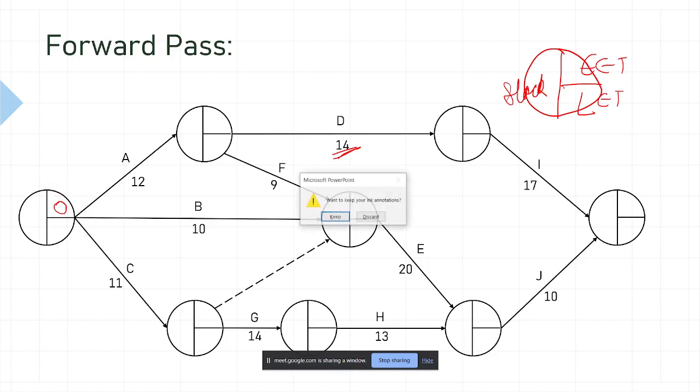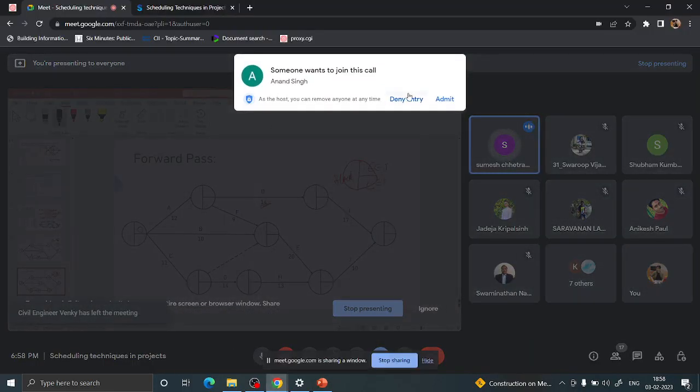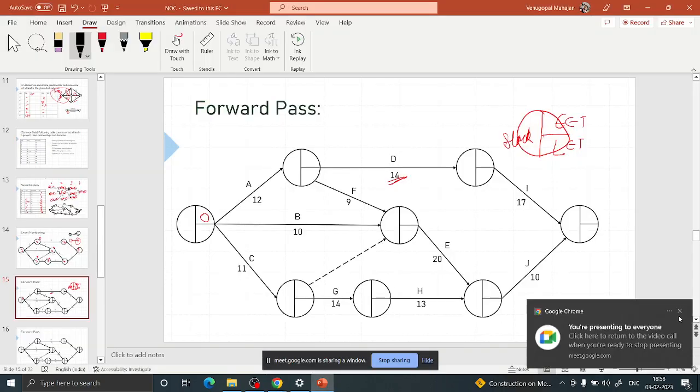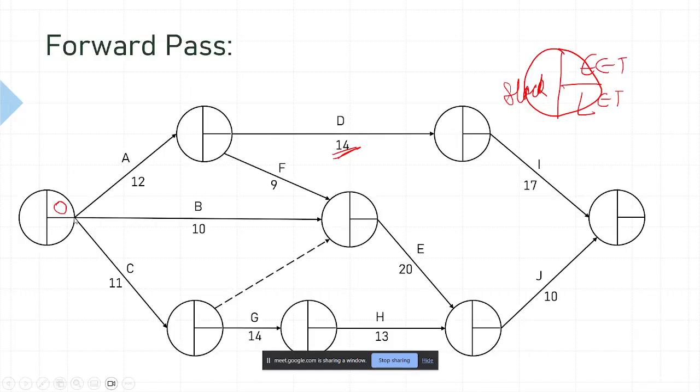In a condition where we have a time period, after so many days we can start the work. Okay. I mean, in case you already have something going on or you already have some calendar here, you can put that value here, right? You don't have to start with zero. So once you understand that point clearly, we'll move on with zero here. We have no condition here, right? So at this point, what should be the value here? 12. Okay.